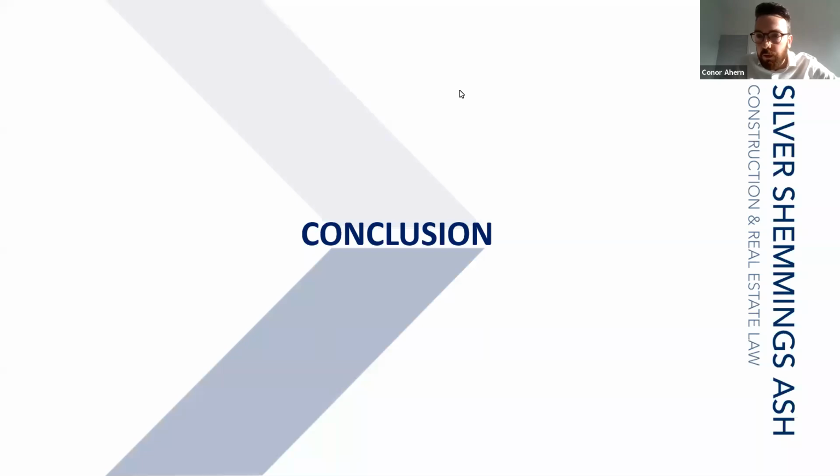If the subcontractor has walked off site and said it will not return, then that's clear grounds for failing to progress the works regularly and diligently. Now, if that has happened, the main contractor should be writing to the subcontractor to confirm that and record it in the default notice immediately. Because again, thinking about your grounds for termination, you want to have given your notice, and you want to have allowed the 14-day cure period.